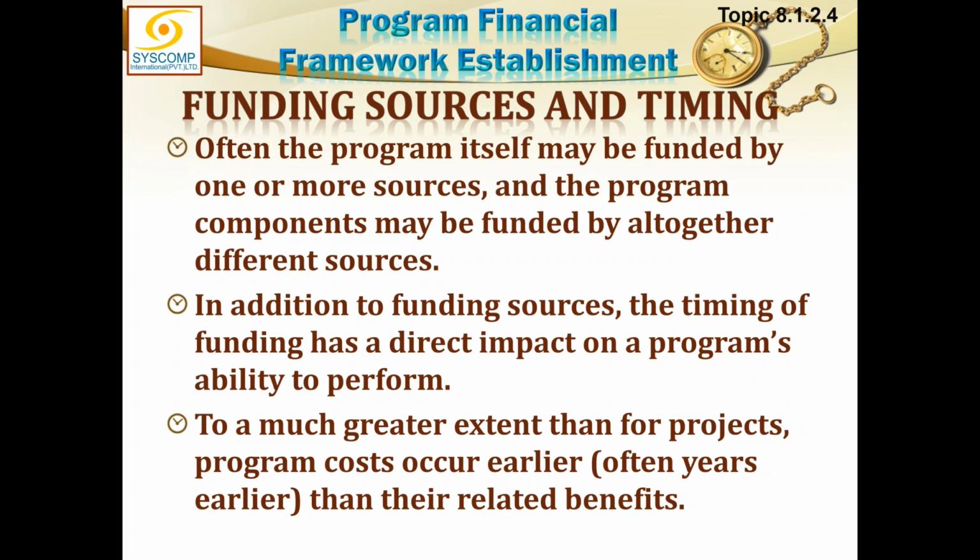In addition to funding sources, the timing of funding has a direct impact on a program's ability to perform. When is this funding going to be available? To a much greater extent than for projects, program costs occur earlier, often years earlier than their related benefits.